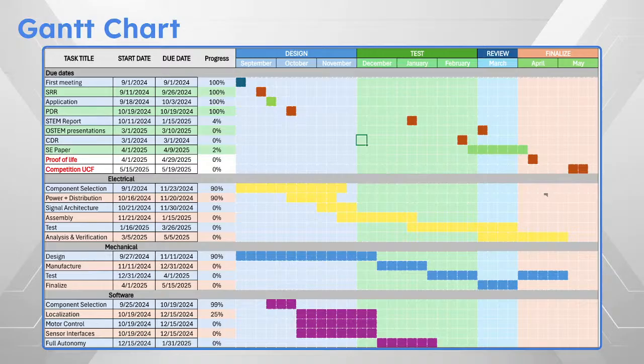What I would recommend is the way you do this in industry: you end up having a PDR package and a CDR package. So you want to put all those schematics that you do have, the test plans from your systems engineering, and the requirements your project management has developed all together in a package that you can send out to your review board before they even get to the review itself.